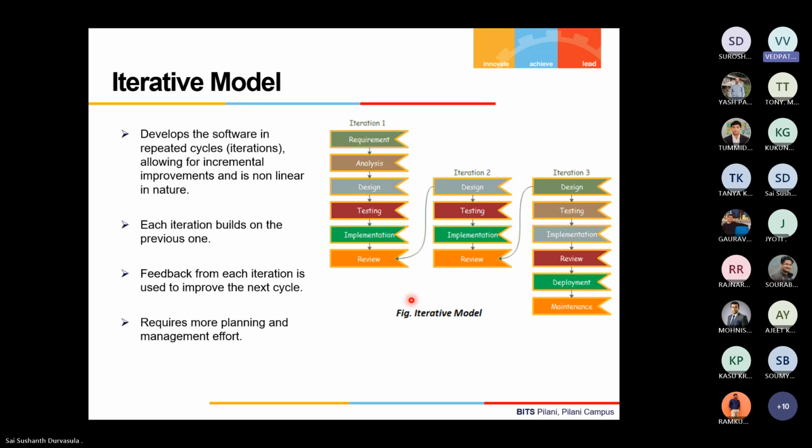Okay, so iteration 2 is going to pick up from where iteration 1 left. Correct. So it is going to refer to iteration 1 outcomes, and also accordingly know which of these should be done. Let's say on a happy path, 3 out of 20 are fine. Then it will pick up the remaining 17, I mean maybe two more from that 17 pool, right? Because it knows now that the first iteration successfully implemented 3 out of 20. So let's pick two more from the other 17. So it depends basically. It's like a loop, and that's why these are called iterations in that loop.